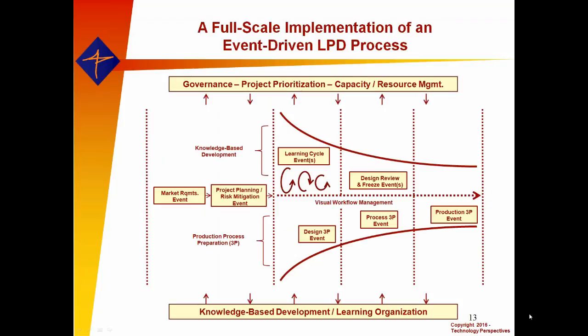write this down. More focus on fewer projects will give you better outcomes, faster outcomes, and over any period of time, more projects completed. The biggest mistake that most companies make is they're operating too much WIP, too much work in process. We're batching projects, diffusing our limited finite resources among too many active things at the same time. The same exact logic that applies to eliminating batching in the factory or in any other transactional process applies here. If you run a critical mass team on projects, the time to market is going to drop significantly.